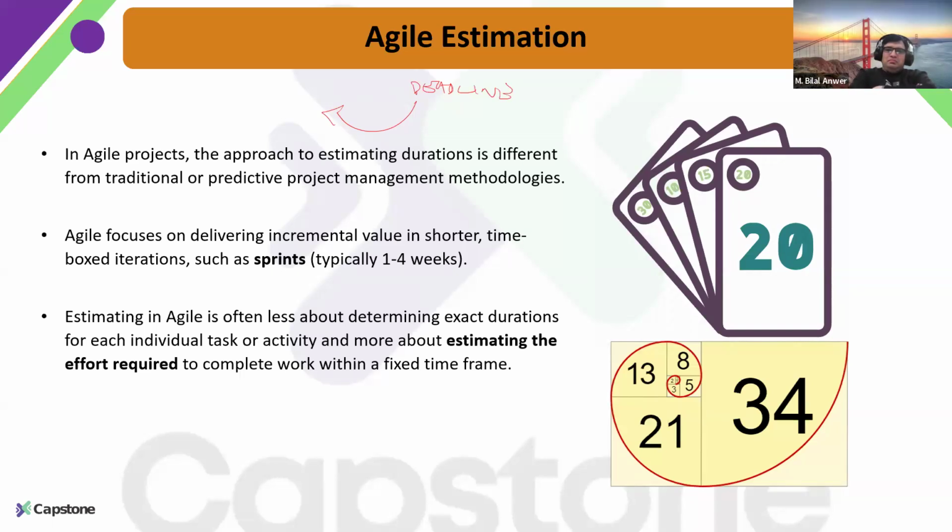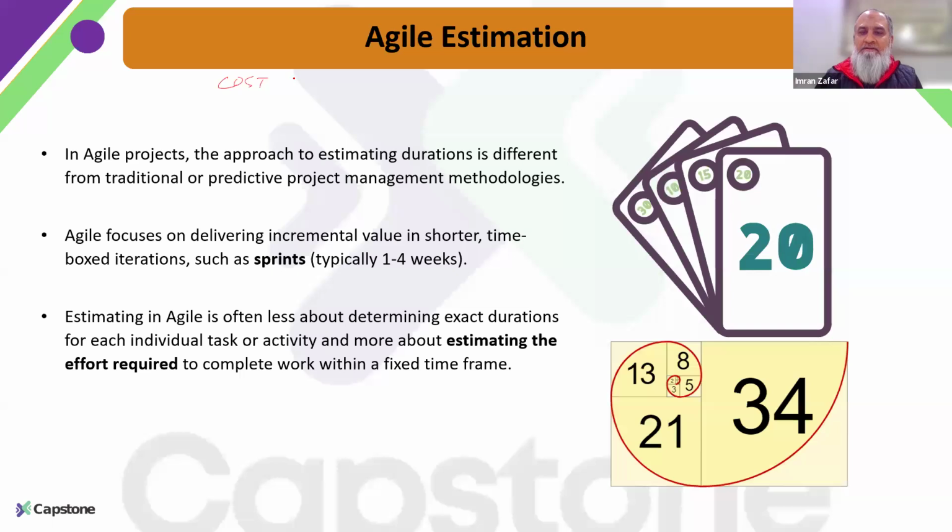Of course, this has implications, because you have to add more resources to pull the schedule back. There are voices from different functional managers, and obviously that may increase your cost baseline. Whatever you have budgeted earlier can carry a lot of risk, and your quality can get affected. A lot of problems, and they actually happen as well.